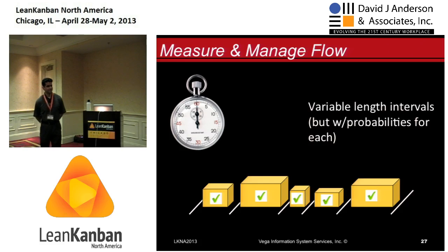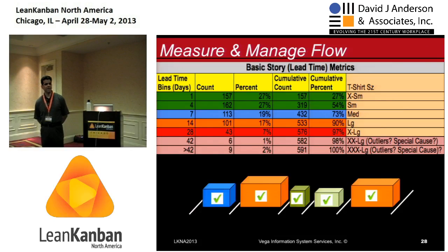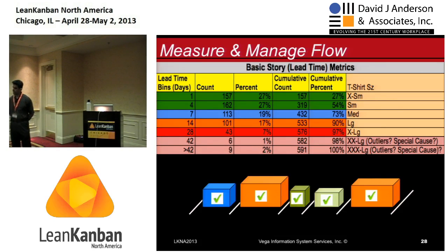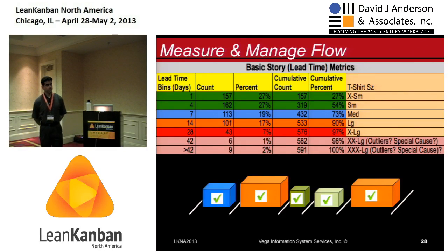intervals, if you will, along with some probabilities that would let us know, I'll give you the better picture here, how many of these small items are we going to see, and how big of an interval are they going to fit in. And then how about these blue items that are just a little bit bigger? And then how about these orange items that are just a little bit bigger? So the key point I'm trying to make here is it wasn't just our current workflow process taking out something. It was our current workflow process tweaked and adding something to it, but adding something to it by using the Kanban method to give us a different perspective, a different insight as a learning tool, knowledge creation tool.